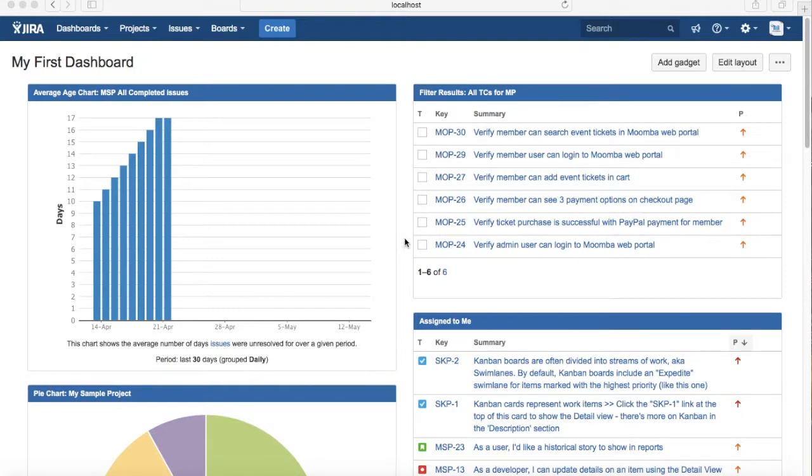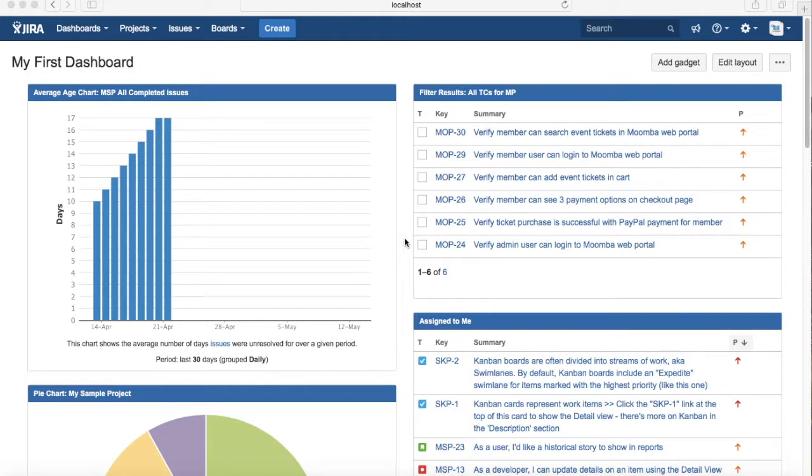Anything which is not directly related to the story can be broken down into tasks, and tasks can be allocated to team members to perform that activity before they can start working on the story. A story is more from a business user or end-user perspective.